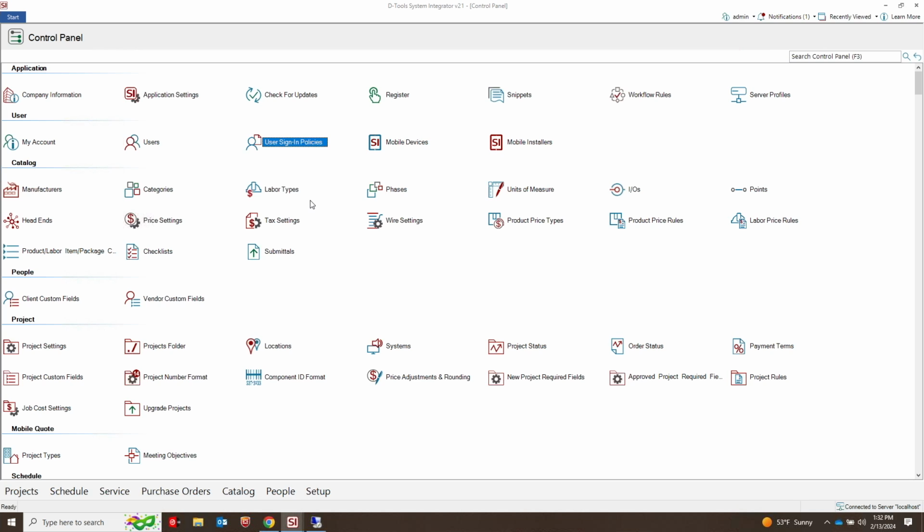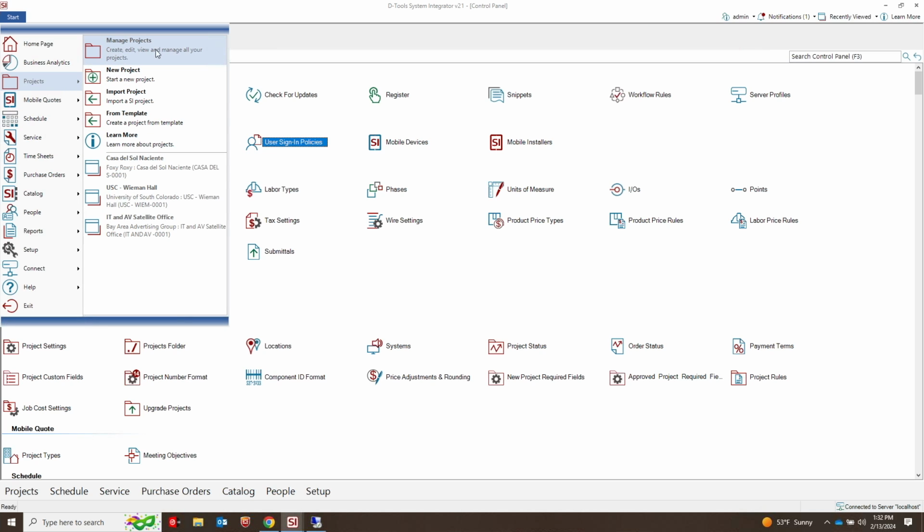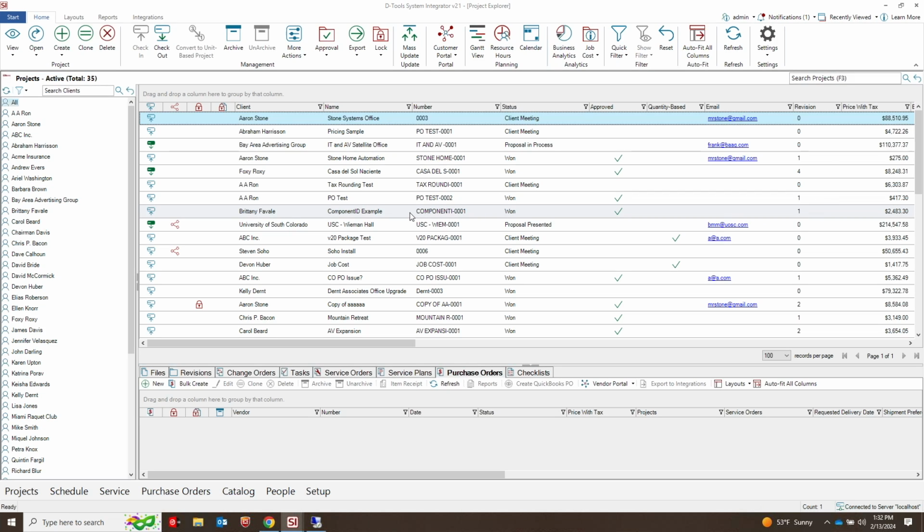Okay, task changes. So Tim mentioned this one. This is a big deal for us because in v20, the one prior to this, we did introduce multiple labor types. That again, Tim explored a little bit when he was talking. Multiple labor types being assigned to a single product. We had a limitation. We knew it when we released that you can only add an item one time to a task. So if there's multiple labor types associated with it, you have to choose which of those labor types you want to be included on that task as far as estimated hours go.